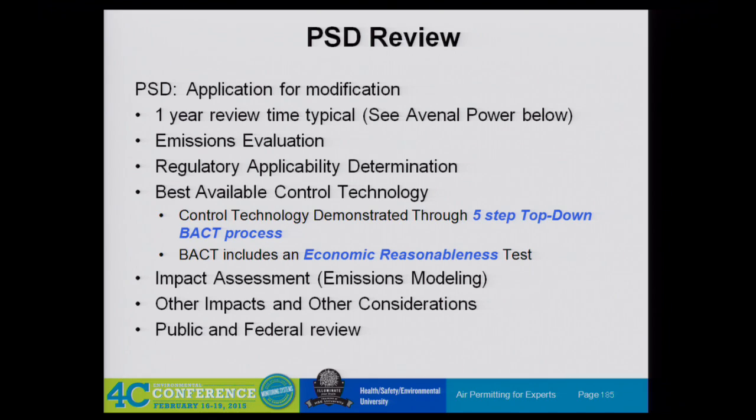And how many have gone through public hearings before with their permits? Anybody? Yeah, how much does that drag out things? A lot, because you have to go through another iteration of comments. Sometimes the agency, depending how tough they are on their own people, goes back and changes something in the permit. You've got to go back and accept that. You have to do something else to respond to the comments. It can drag out, even on one cycle of hearings, let alone 2 or 3 cycles.